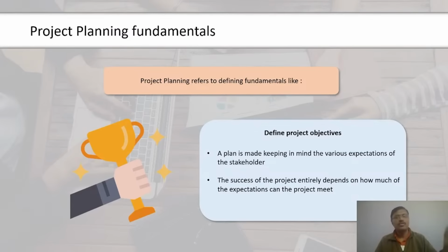Project schedule provides aggregate cost in a particular calendar period to ensure how much money can be made available during that time. Similarly, the resource calendar provides information on the resource assigned to the project at a particular point in time. This information is then used to indicate resource costs over the duration of the project. The risk register gives an understanding of the overall level of risk on the project and, therefore, the level of contingency reserves that need to be built into the budget. Agreements entered into with suppliers are also required to finalize the budget.